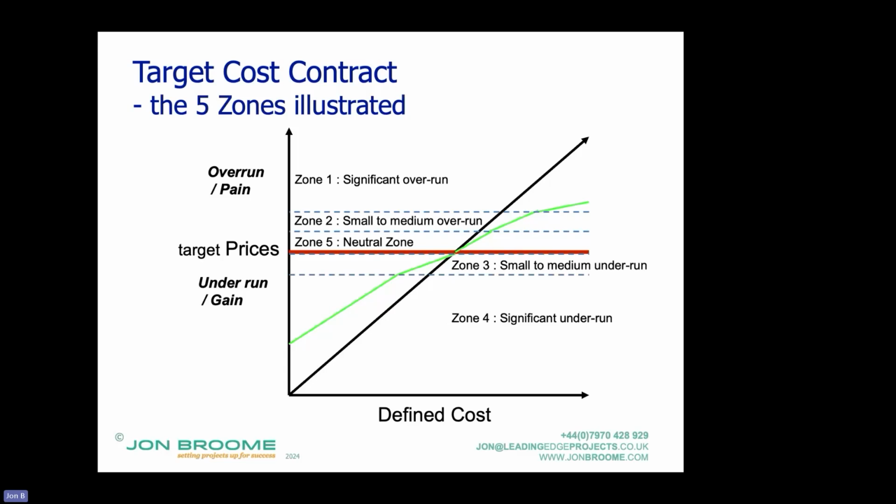So, for instance, when I was doing my research, National Power used target cost contracts. They would often let the contract when they had met a figure which meant it was commercially viable, if you like. So it might be that they have a pretty loose performance spec, and they know there's loads of fat in there. In which case they'd say to the contractor, you're only going to get 20% of any gain because we know there's fat in there. You don't have to work too hard for it.